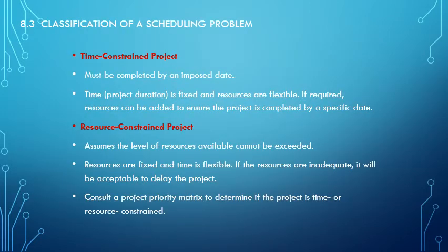A time-constrained project must be completed by an imposed date. So in that case, you're probably going to look at ways to add resources, whether that's working overtime or getting extra equipment in order to make it happen. And why would we do this? Think if there's a government mandate for a changeover to happen, or we're trying to exploit a market and we want to be first to market, we're going to put a date on that and we're going to stick to it.